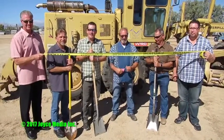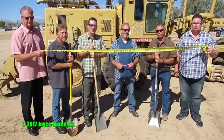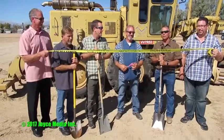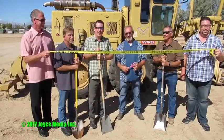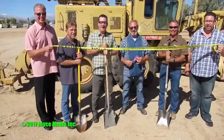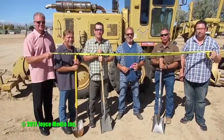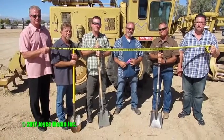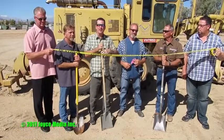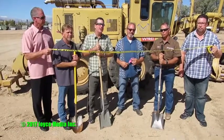And what's the estimated cost to build this structure? Boy, you know all the good questions, don't you? Well, over $100,000. We're going to keep you guessing a little. Everybody is curious about that. Is it a $1 million building? 5 million? Is it 10 million? It's somewhere in the $500,000 to $750,000 range. And the size is about 13,000 square feet.